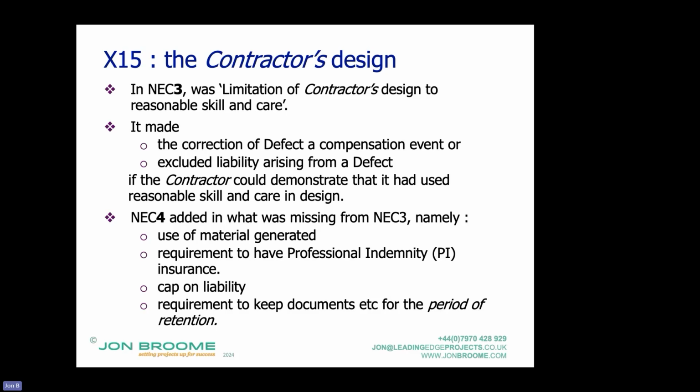And what's more, without this, it means that the project manager, and this is a common scenario, the project manager from a consultant organization who should have done the design, they haven't. So the project manager tries to add in design to the contractor to avoid blame falling on their own organization, because this isn't specified, since the client's consultant should have done all the design. Along with the definition of the works, the contractor is perfectly within their rights to say, that's not the basis on which I entered into this contract. It's outside my scope. I'm not doing it.